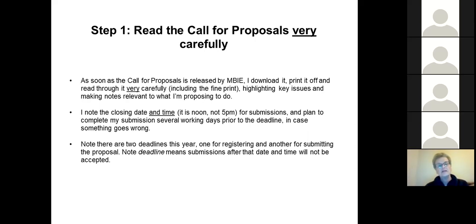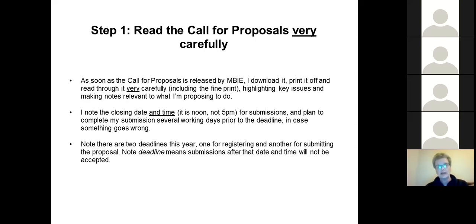I plan to complete my submission several working days prior to the deadline in case something goes wrong — the first year I applied something did go wrong, but I had two days up my sleeve to sort it out. Important to note that there are two deadlines this year: one for registering and the other for submitting your proposal. Deadline means deadline — once they close it off, that's it. If you submit at 12:01, it's too late.